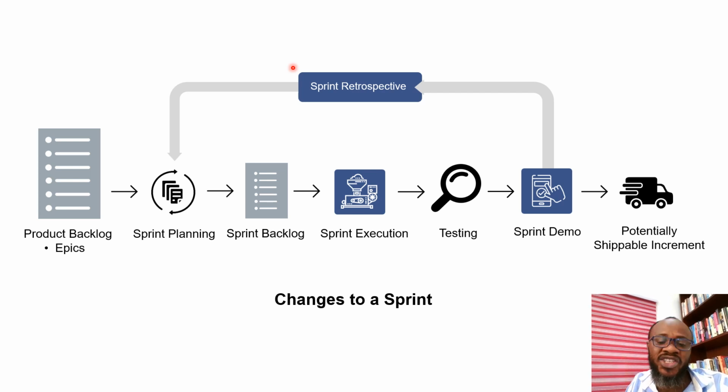If it is that urgent, the current sprint in progress is terminated immediately and the issue is attended to. If not, then we would have to wait for the sprint to complete before the issue which has been fed into the product backlog is attended to.